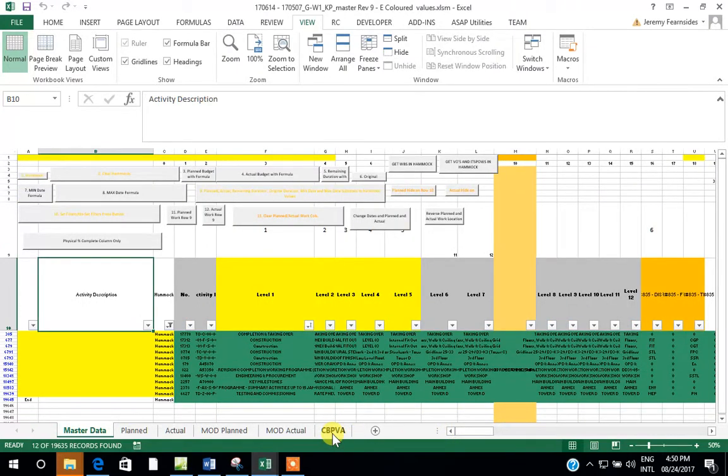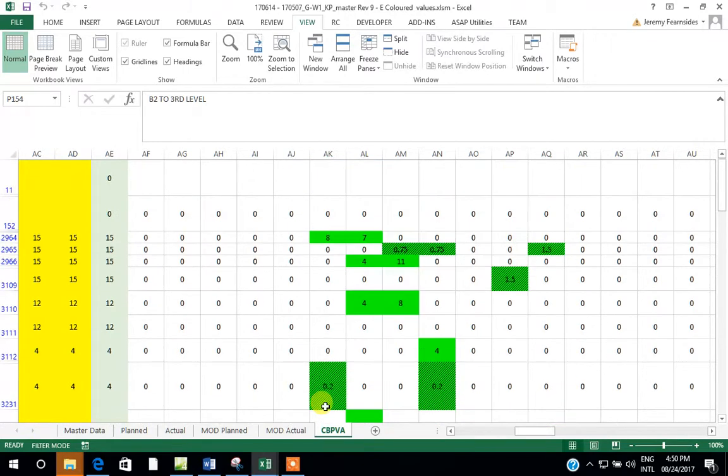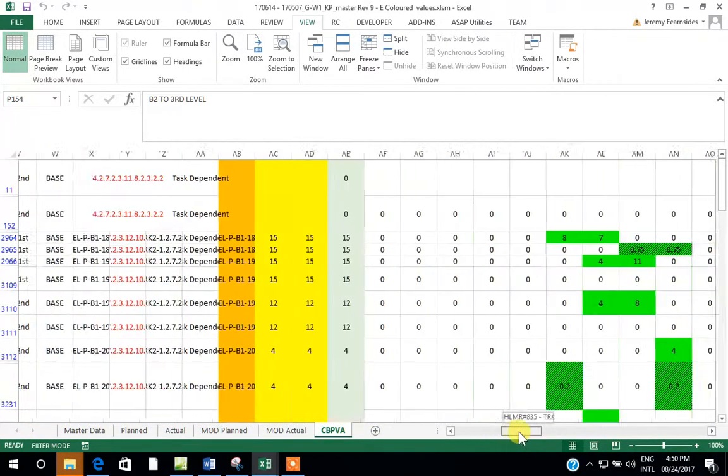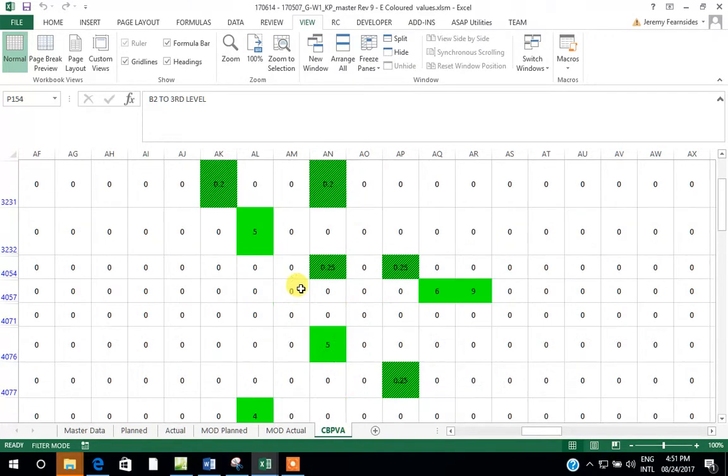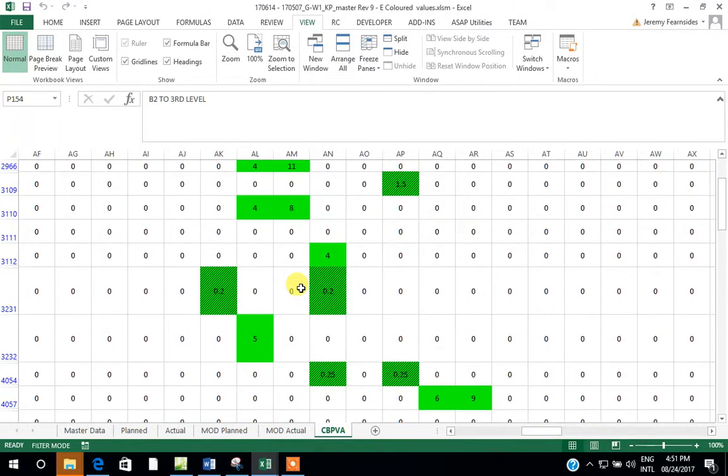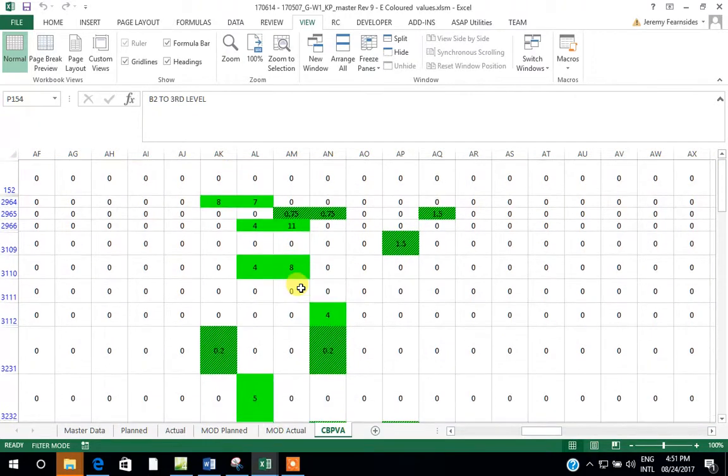From this data, then we can go on to produce these charts, planned v as-built. This is at activity detail level and summarised down to, I think it's just electrical. And therefore you can see the units actual employed and the units planned. From that information, then we can determine delay as per the graphs.